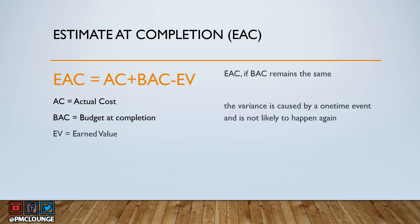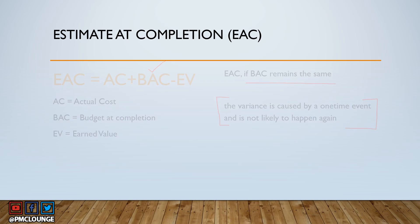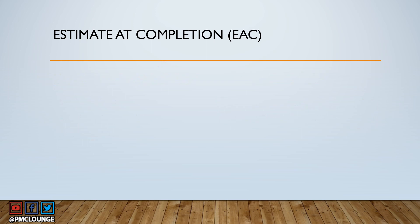Another EAC formula: EAC equals AC plus BAC minus EV, where AC is Actual Cost, BAC is Budget at Completion, and EV is Earned Value. Use this formula if BAC remains the same and the variance was caused by a one-time event that is not likely to happen again.